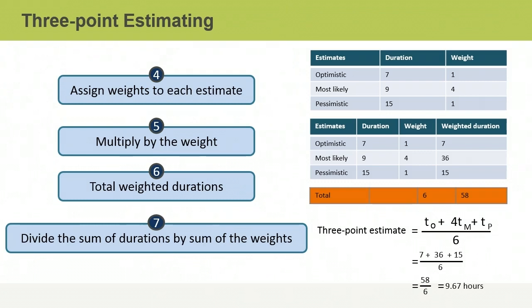The fourth step is to assign weights to the estimates. You need to assign weights that reflect the probability that each estimate will turn out to be accurate. If you're using a beta distribution formula, you assign a weight of 4 to the most likely estimate and weights of 1 to the other estimates. A weight of 4 means it's 4 times as likely to happen as an estimate with a weight of 1.